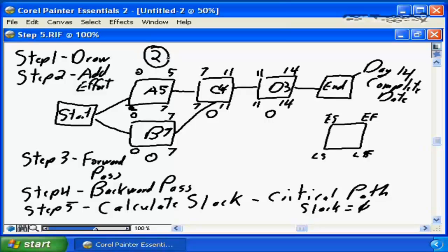And any impact that's going to be greater than 2 delaying task A from finishing is also going to have an impact on our completion date, but we know we have that slack, we have that available time of 2 days allowing A to start late or finish late. That's still not going to impact our ability to complete our project on time.